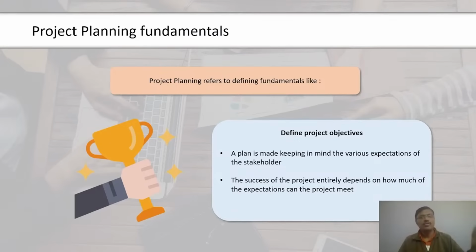Cost of quality is the cost that needs to be incurred to make a quality product. The sum of all the costs incurred in ensuring that the project conforms to requirements is cost of quality. Cost of quality can be broken down into two major categories. First is the cost of performance, or the project total figures. Then there will be some intervention costs, which is the cost of prevention, like training the team, creating equipment, and so on. The other subdivision is appraisal costs, or cost for assessing quality, like testing, destructive loss, and inspections.